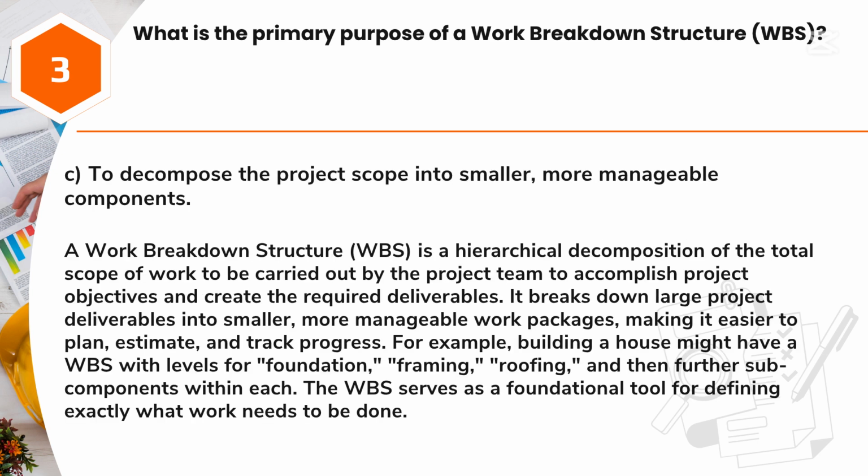Answer: C. To decompose the project scope into smaller, more manageable components. A work breakdown structure, WBS, is a hierarchical decomposition of the total scope of work to be carried out by the project team to accomplish project objectives and create the required deliverables. It breaks down large project deliverables into smaller, more manageable work packages, making it easier to plan, estimate, and track progress. For example, building a house might have a WBS with levels for foundation, framing, roofing, and then further subcomponents within each. The WBS serves as a foundational tool for defining exactly what work needs to be done.